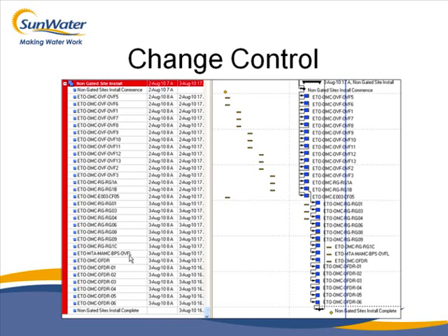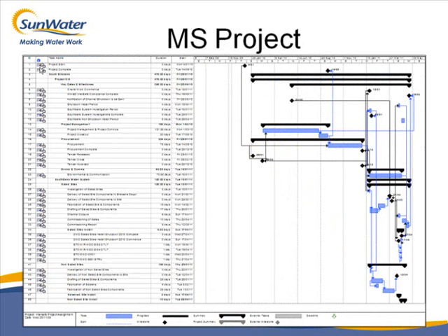So they're able to finish about 3, 6, 9, 10, about 15 or so in one day with 2 guys going. So that has brought this back in line. We actually finished earlier than what we thought we would. It took them 2 days to install what we thought was going to take them about a week and a half, 2 weeks, which is good. But not being on the critical path, it didn't really matter.